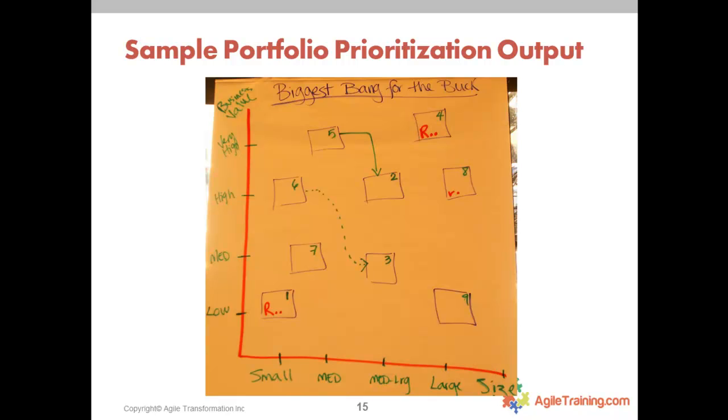Four things into account: value, size, dependency, and risk, because you might make completely different decisions when you realize that something, even though it has low value, is a mandate project by the government and has a pretty steep deadline and a pretty big fine if it doesn't get done, and so it really does become your number one or number two priority.